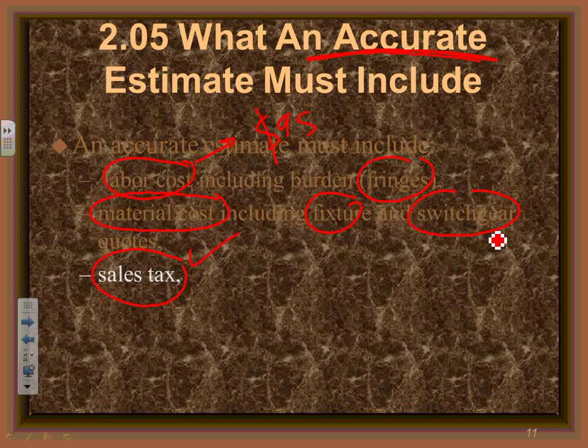Add, what is it, 7.7 something or 7.8 almost. Subcontractor and rentals. If you need to subcontract the concrete and the trenching, you have to add it there. And if you rent the trailer, so your electricians and your project managers, guys, can sit there and visit with you, you have to include this one in your project.